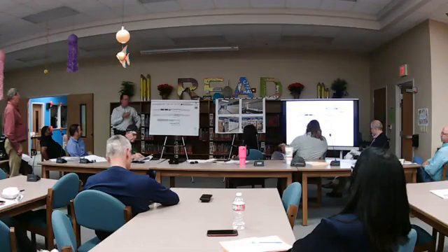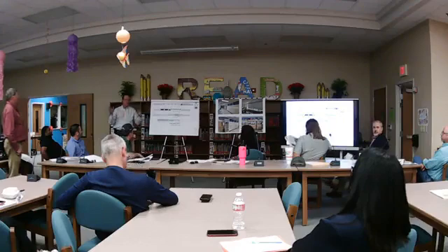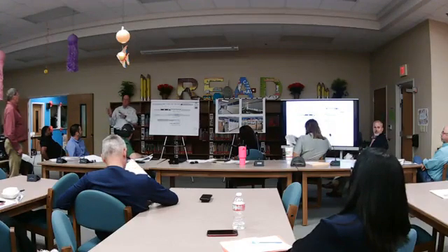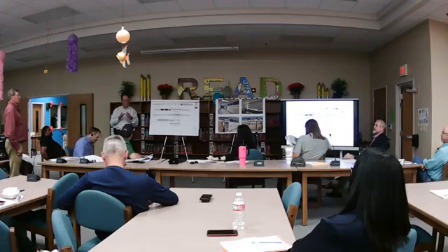Those panels and glass will go, and I think some of the caulking around some of the windows is also asbestos, so we're removing those. Then after those are out, we will have the outside framed, in between the structures, because basically those windows really are the structure, those exterior walls.